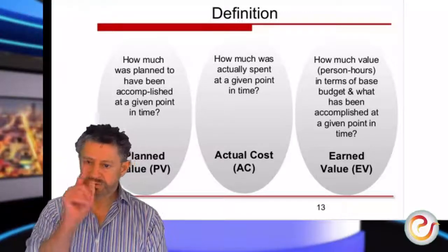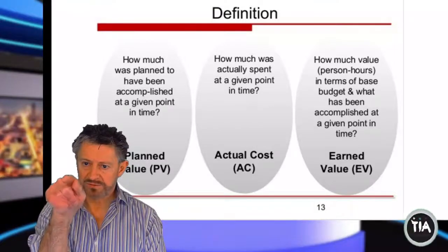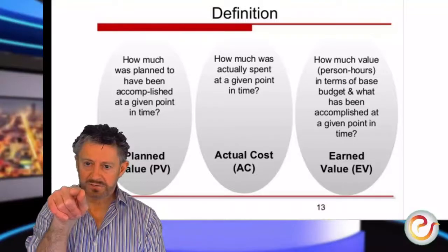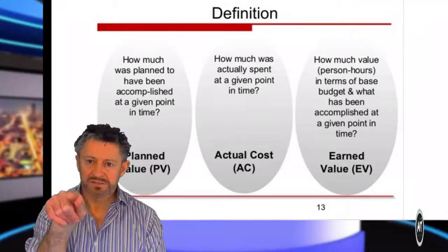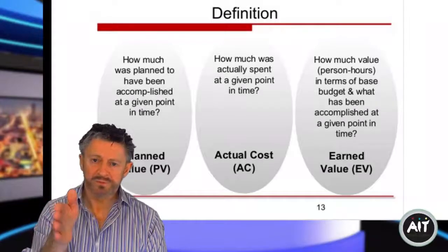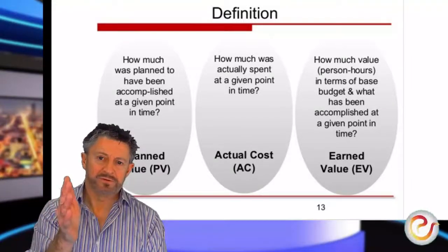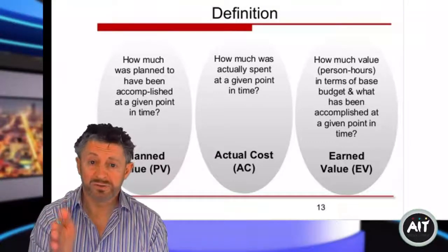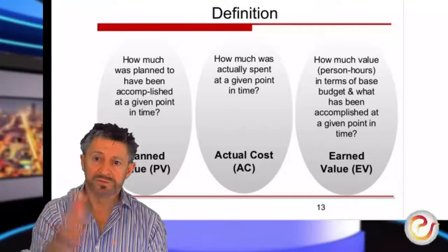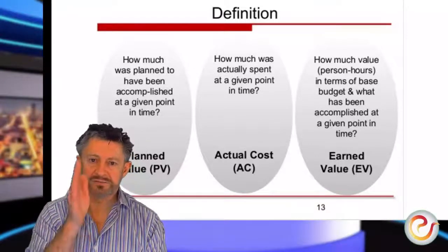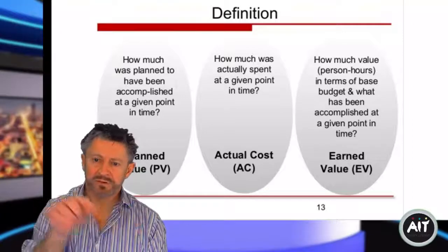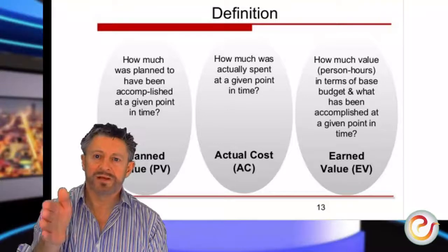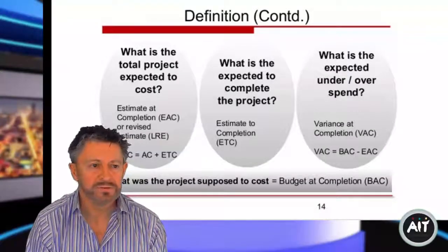So in 6 weeks we look at our base value, our planned value figure, and that is our earned. Anything done on that at this point in time, we know we've done this amount of work. That's our earned value, which might be, let's just say of the 150,000, it's 30,000 euros worth. That's how much we've earned of the project according to our plan. We've completed these activities on this date. According to our plan, we should have earned 30,000 euros worth of value, work completed.